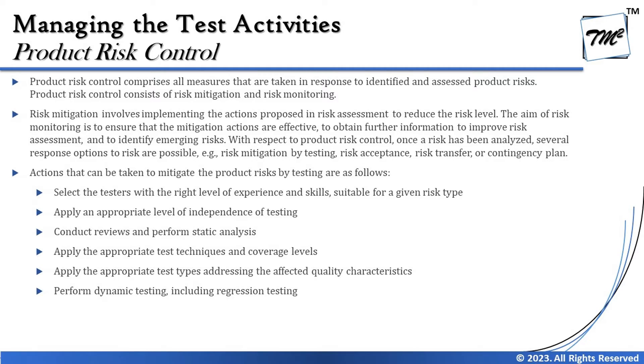So we have four options when a risk is identified: mitigate it, accept it, take a contingency plan to prevent it, or transfer it to the right team. Actions to mitigate product risk by testing include: select testers with the right experience and skills for the given risk type, apply an appropriate level of independent testing, conduct reviews and perform static analysis, apply appropriate test techniques and coverage tools, apply appropriate test types addressing the affected quality characteristic, or perform dynamic testing including regression testing.